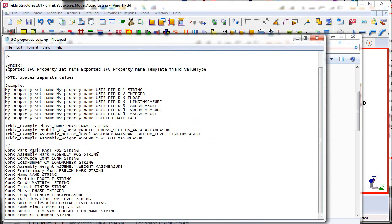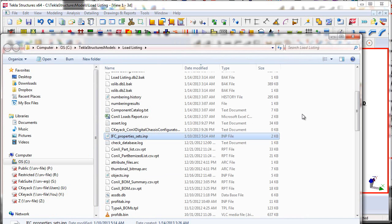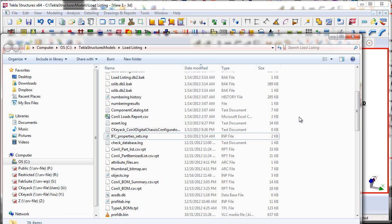And what I've done is I've made sure that I've included the load number, User Defined Attribute here, inside of the IFC Export file. This is really handy, so that way when I export the IFC, then bring it into Tekla BIMSight, we'll be able to see the grouped load numbers that we did here in Tekla Structures, but see that over in Tekla BIMSight for the erector.